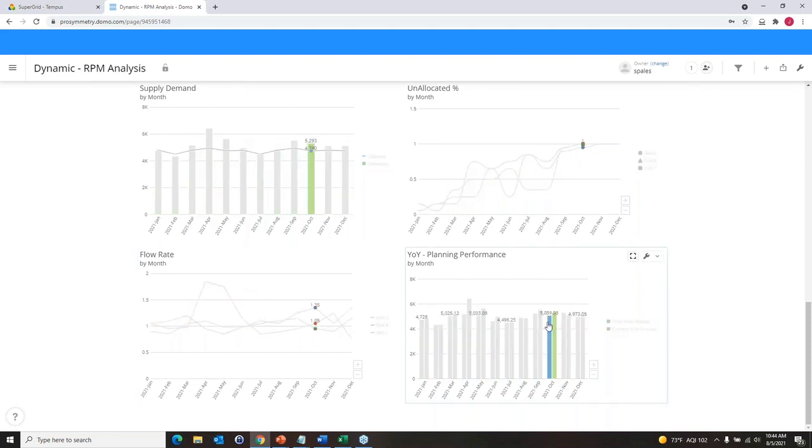And then lastly, this is more of that year-over-year situation where, what did we do last year? What did we do this year? And instead of just drawing the delta, which might be simpler to see, I wanted to show side by side prior year actuals versus the current year planned. So in this case, we're looking to deliver, I'm sorry, 6,400 hours of work. Last year we delivered slightly over 5,000. So again, a misalignment between capability and an expectation.